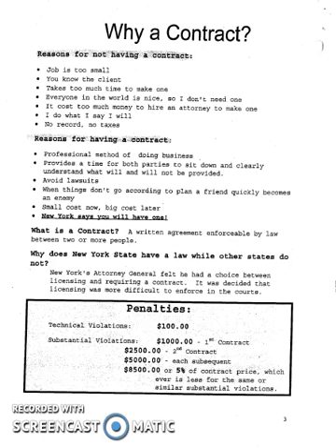Interesting to note that in most counties throughout New York State, you are not required to have a license to perform work in the capacity of a contractor. There are specific counties, mostly around the New York City area, that do have licensing requirements, but in upstate New York, where we are here, there's no requirements for the contractor to be licensed. However, according to New York State law, they must have a contract.